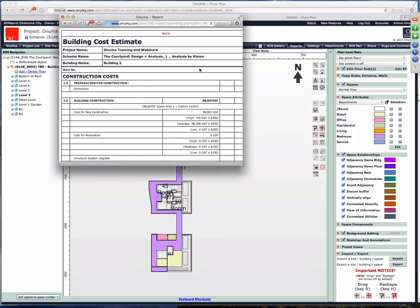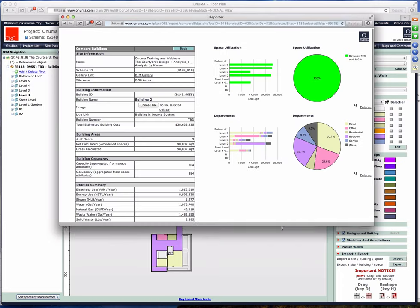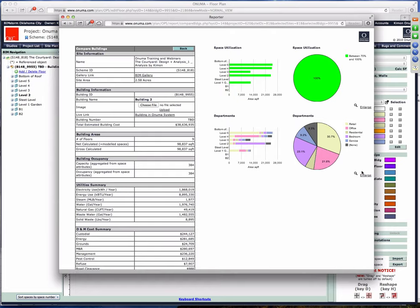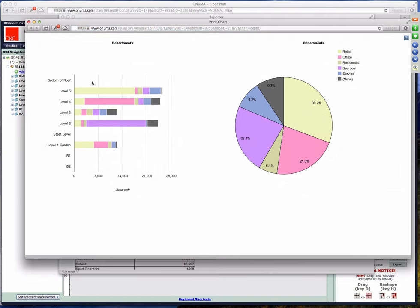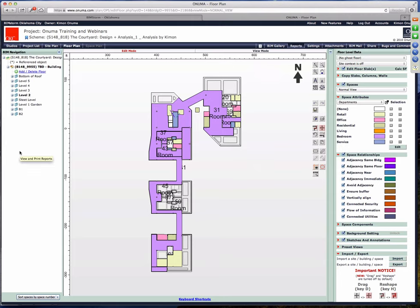If you look at the Uniformat that Amy had coming out of the Revit model, the percentages for fees and contingencies were different. If you want to use these as comparisons, you really have to adjust the defaults so they match in both places. An estimate can be really far off if you've got a construction contingency of 5% in one place and 15% in the other. The building report is now being updated automatically floor by floor — we have 17,000 square feet of retail on the fifth floor. Probably not ideal — we probably want retail down below.